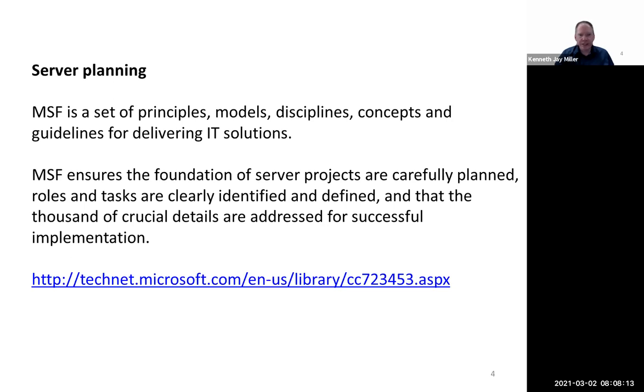I did not realize that we needed this adapter to connect this fiber to this switch. And here you are in the implementation phase, and all of a sudden you need to order a part, and you come to find out it's back ordered for 3 months. And then what do you do? I don't know. So you have to be prepared.